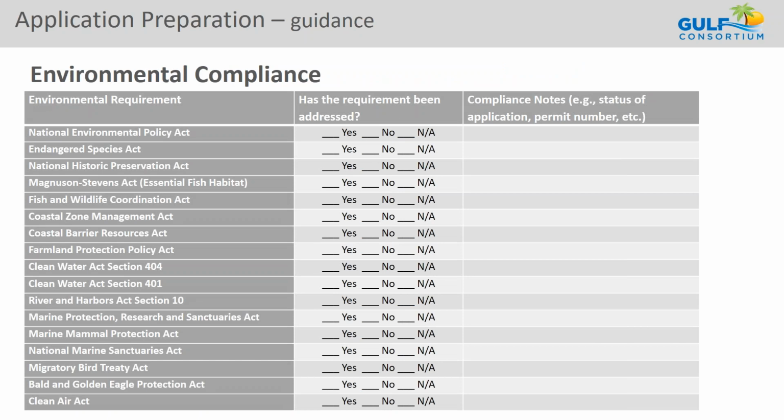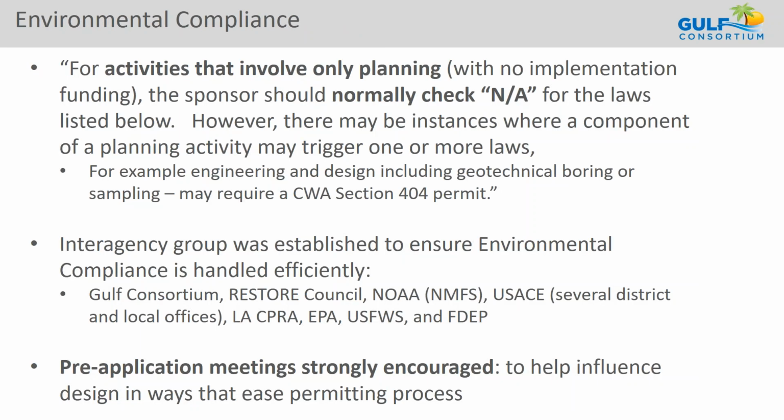Environmental compliance, there's a really big long checklist of these. I think there's like 14 different environmental requirements of different types of acts that might be in play depending on the type of project and where it is. So this is the environmental compliance checklist. Every project application needs this environmental checklist to be completed. For engineering and design work or for planning projects that are preliminary design or feasibility studies, pretty much everything can be not applicable.